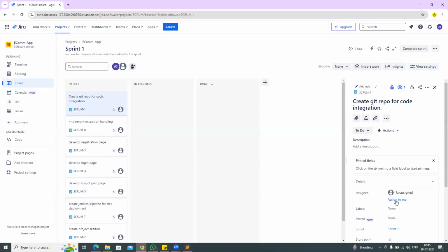Currently, some projects follow this process. In some other projects, a scrum master or tech lead will assign the stories to the team members. In some projects, every team member should assign the stories to themselves. Nobody will assign the stories to them. They should go to the JIRA dashboard, identify the pending story, and take that story into their bucket.